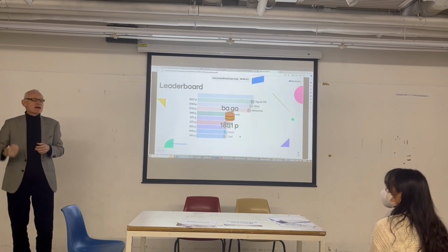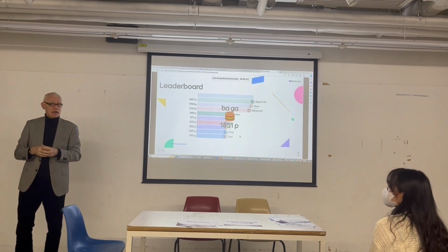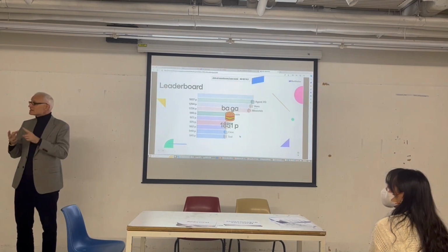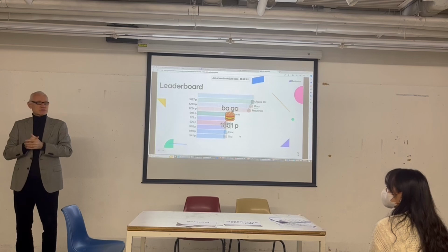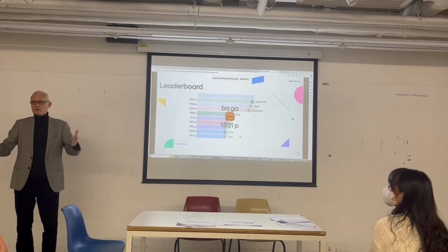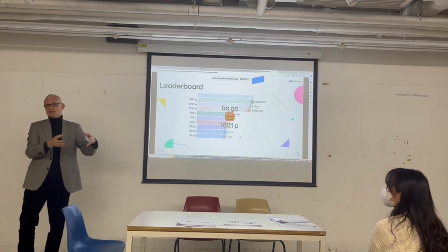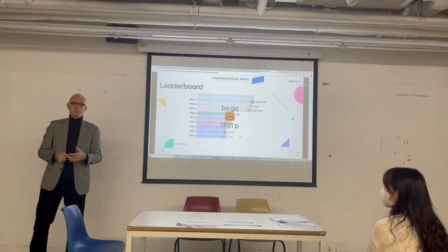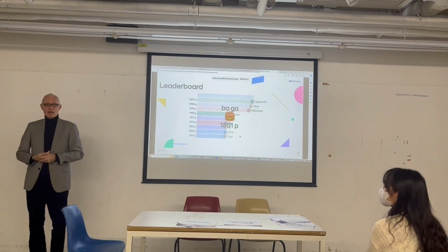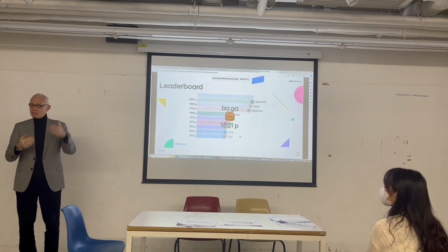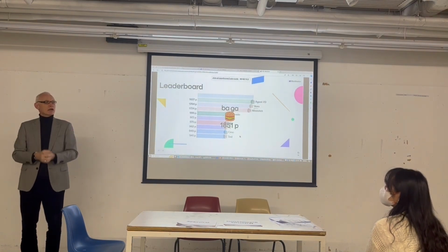Nobody wants delays. Government don't like delays, but you and I don't like delays. It's a pain. So extension of time is given under duress, really. Yes, of course, if there's a typhoon and nobody can work, you've got to give a day or 2 days back that was lost because the contractor can't do it. But sometimes the contractor will go too slowly, and you need to say, hurry up, you're going to miss the deadline. You're not performing.